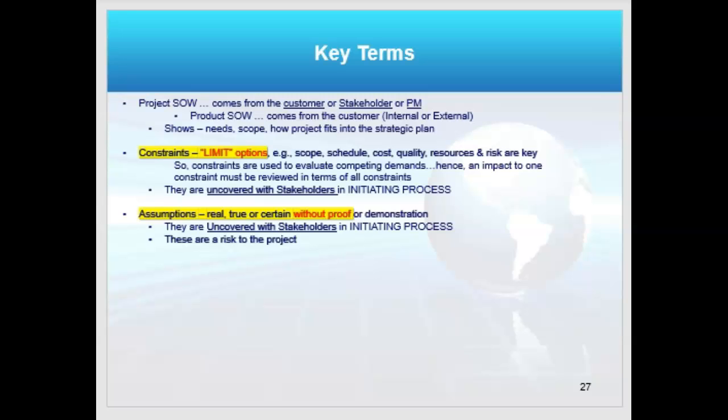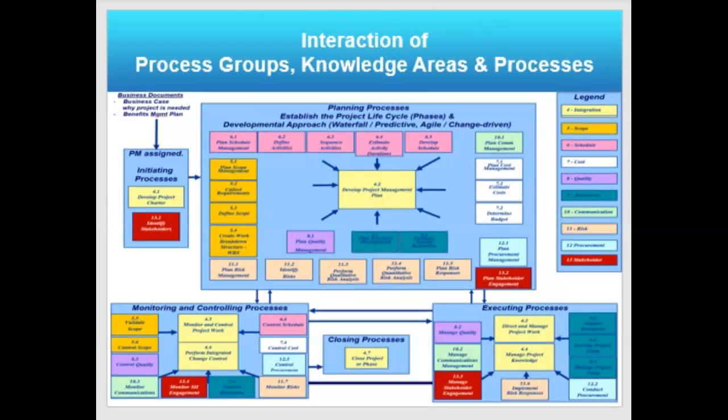And then there's assumptions. Assumptions, we've said, were real and true without proof. So frankly, that's a risk to me, and I would add it to the risk register, okay, which we'll talk about later. So this is what you're doing.